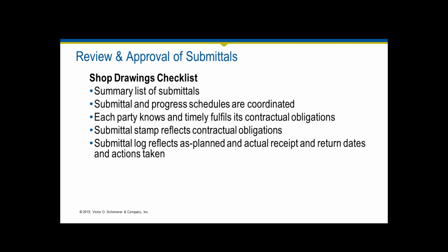For this to be a profitable endeavor for you, you need to think: okay, what is the summary list of submittals? Are these coordinated? And is each party fulfilling their contractual obligations? And do we have a log that is fairly standard now that reflects both the as-planned and actual receipt and return dates and actions taken? This allows you to review how long it's taking you to review the submittals and make sure that the time you're allocating to these activities is reasonable and that you are learning from the submittal process,